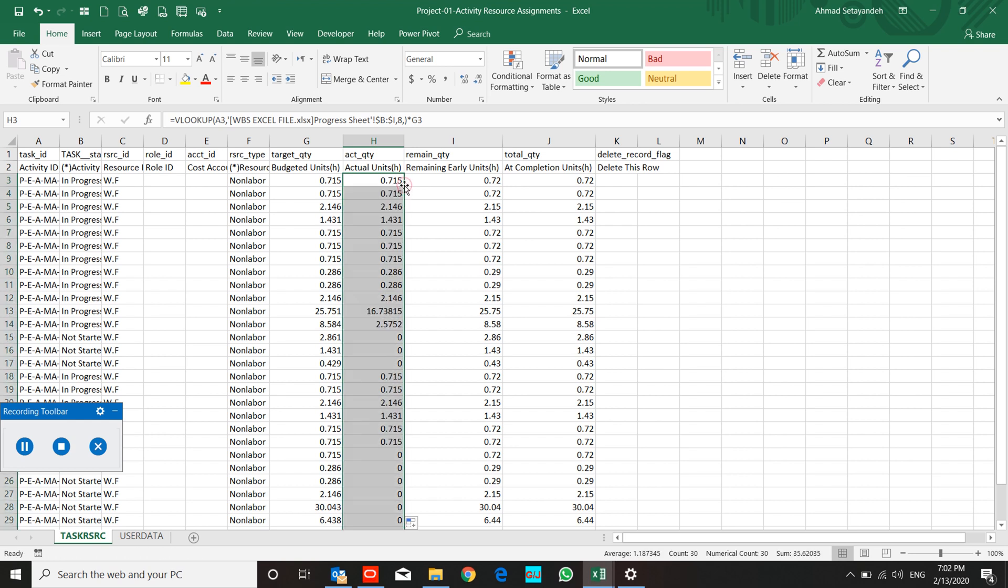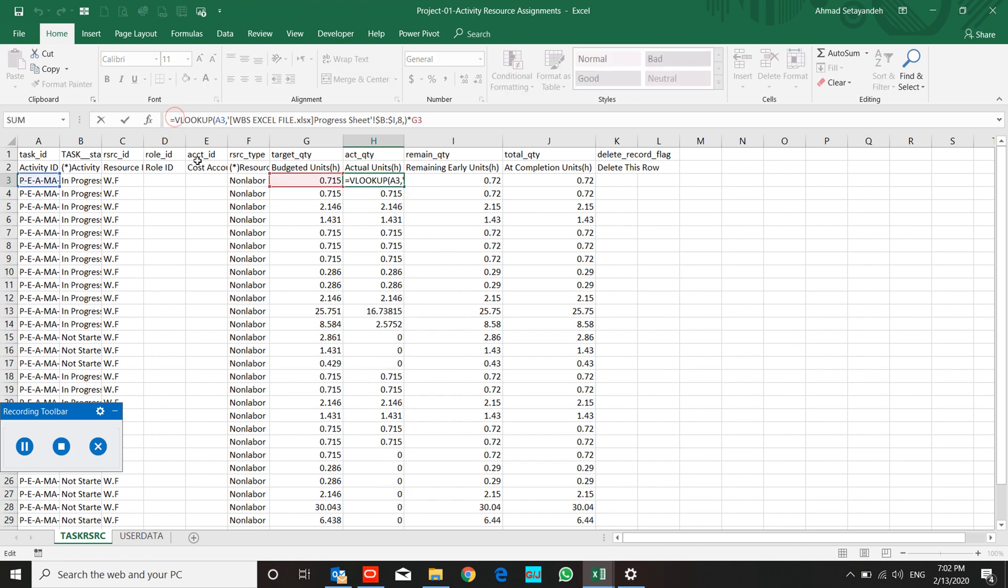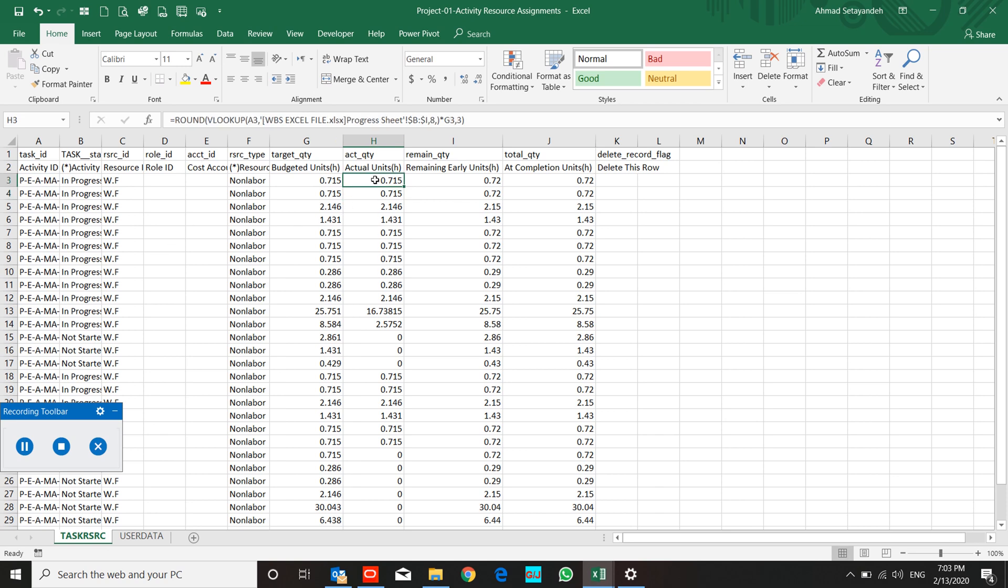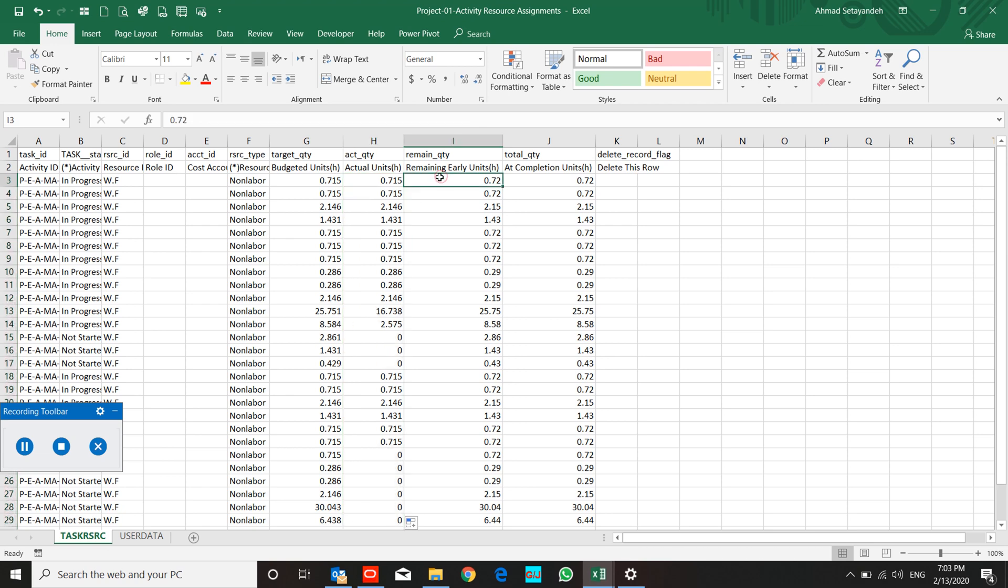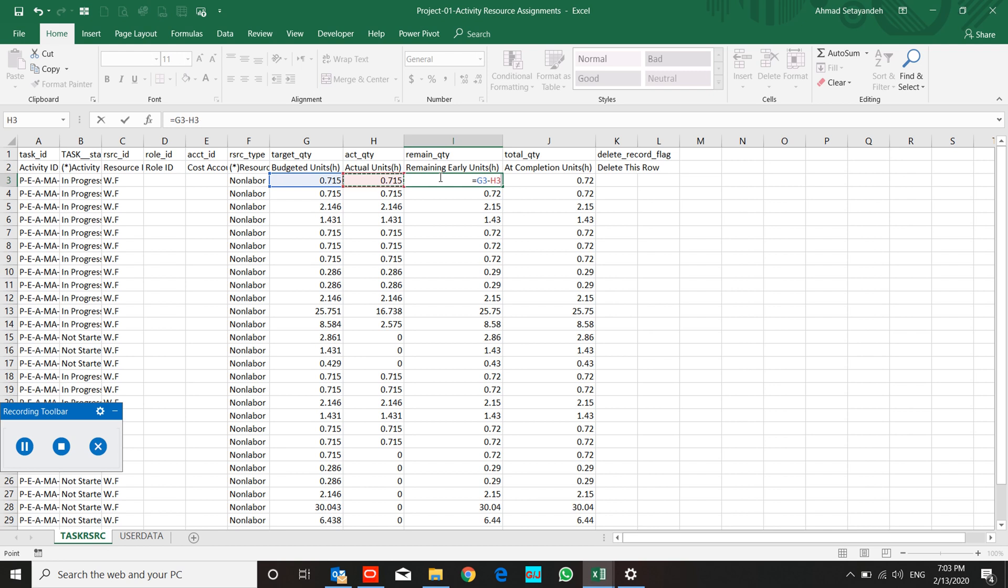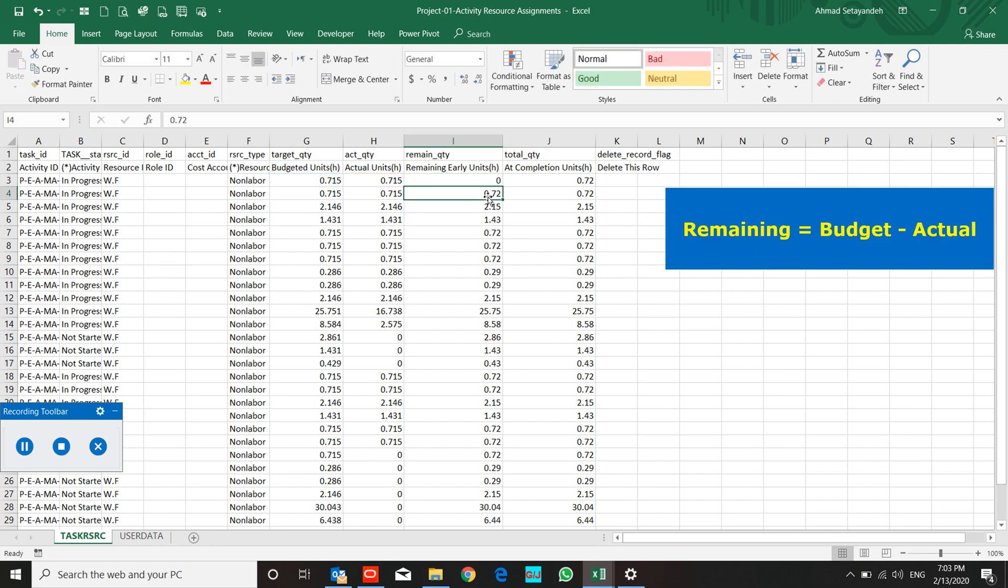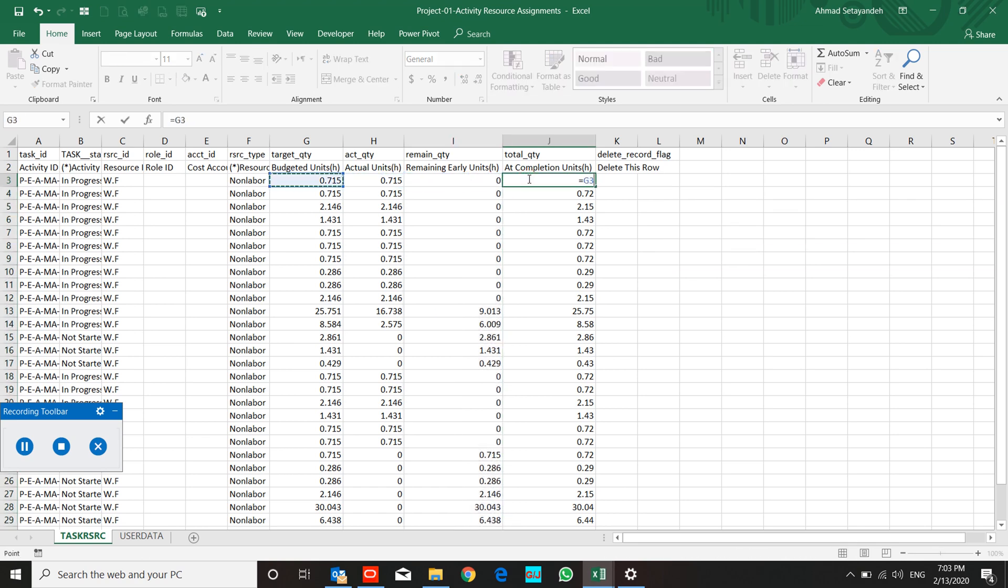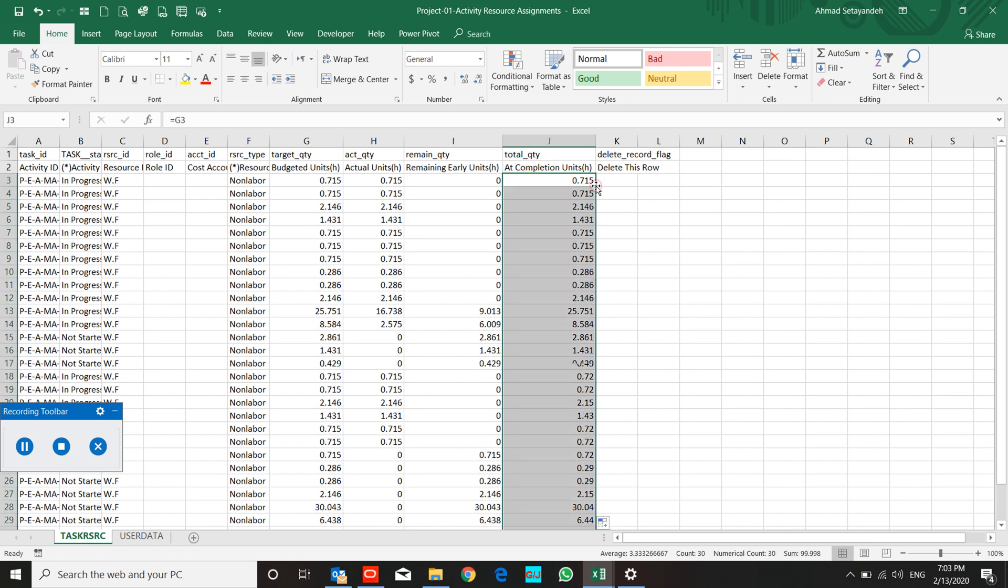And develop it. Also, I must round it to three digits. And remaining is budget unit minus actual unit. Add completed equal to budget unit. This depends on your project assumption. These two fields do not need the roundup because you rounded it at other fields.